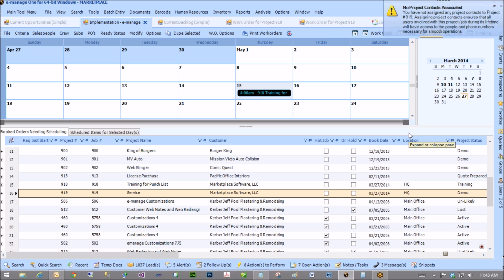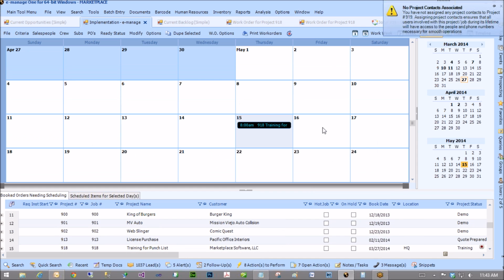Good. I just wanted to add for anybody that's attaching documents that correspond with the punch lists that are being added, to make sure that the documents have the same name as the option, the order name, so that everything stays consistent. Because when you look in documents, let's say you have 2 different vendor quotes, if the one isn't named appropriately for that punch list, whoever's placing the order is going to have a hard time figuring out which documents belong to which order.